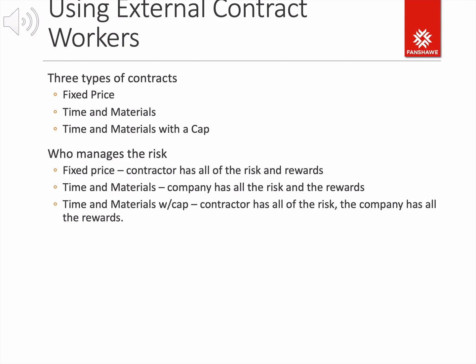So they might estimate that it's going to be $8,500 to produce something, but if it takes longer than they anticipated and it ends up being $12,000 instead of $8,500, well, that's just the way it goes. Too bad. And that's what happens on a time materials contract. You're really paying hourly for the work of the outside agency with no total in mind, just the estimate, but that's it.